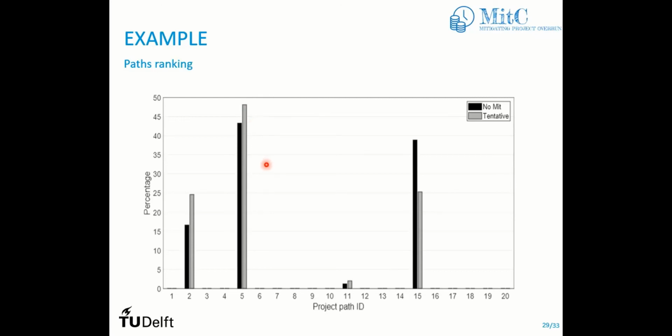And something that's really interesting: if you do a deterministic study, then it's path number 15 that is the critical path. But when you are doing probabilistic, then it's number 5. So you see, the deterministic approach is misleading in this case. There is no such thing as the critical path. Mm-hmm. Yeah, that's true.